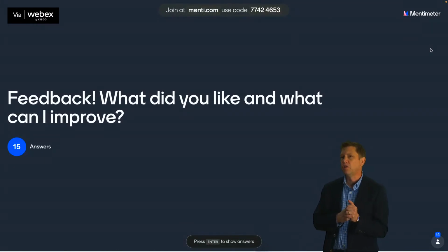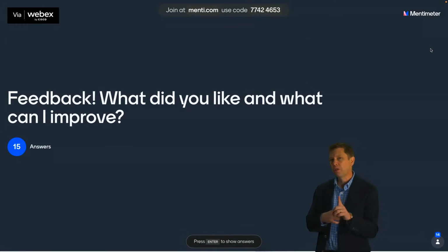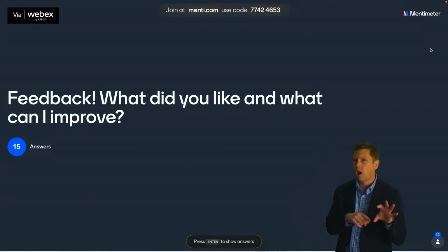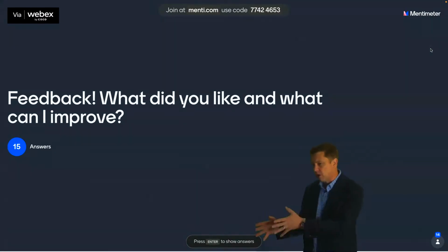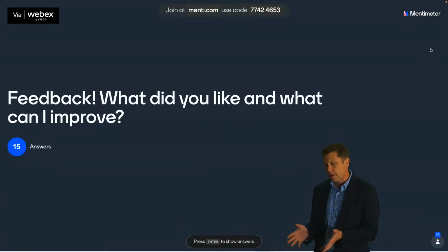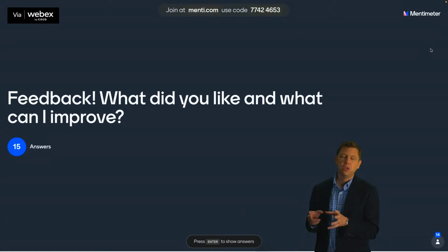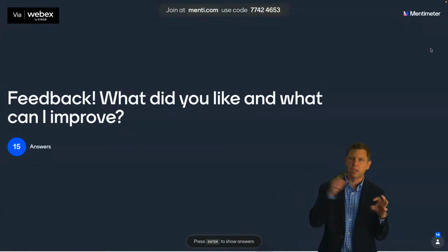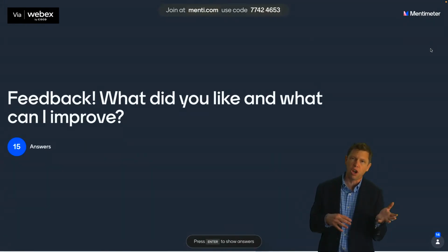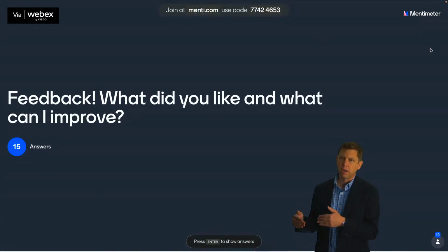So what we did is we actually did the cutover every weekend for 20 weeks leading up to it. What that forced us to do is make it very automated. We had a script and some manual stuff that takes everything and moves it over, and then on Monday morning we'd look at what failed and deal with that. It brought the experience to the beginning, so we started getting experience with it early on, and we were able to work out all the bugs.